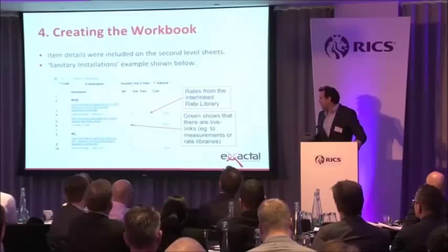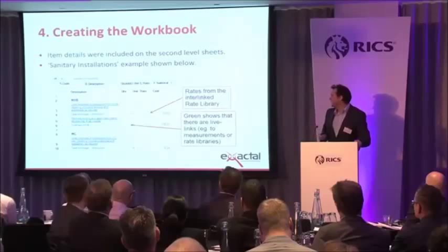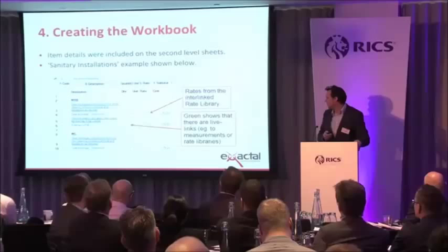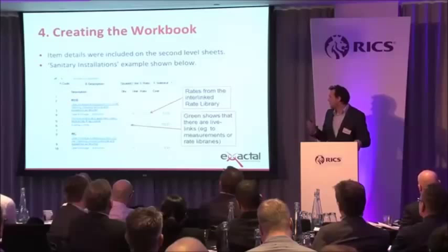In the minor maintenance calculations, we've broken down and demonstrated those calculations. We've got a quantity of two WCs — clear blockage obstruction in the WC, or possibly overhaul the washout basin. Again, there are a number of different items in that, just showing the actual calculations. So we do the calculations there — that's quite traditional: quantity, unit rate, and cost.